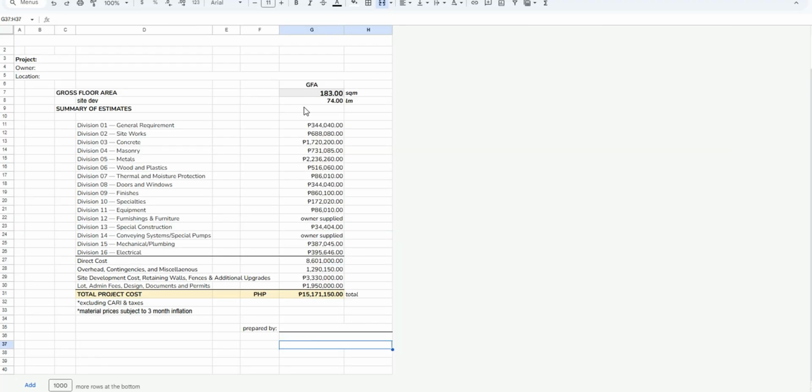Now a summary I made before will look like this, where if we are the contractor and a developer's tile, we always focus on the floor area. That's why you would see cost per square meter, because it's so easy to cost based on the floor area. But my site development is not a floor area when it comes to like fencing and gates.